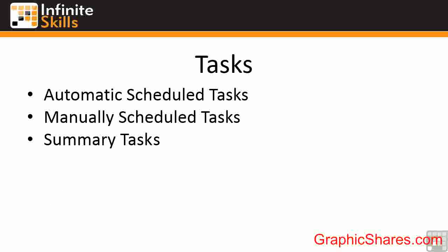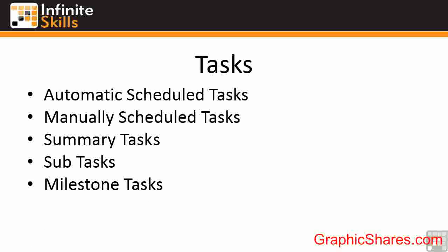Tasks have different types. You can have summary tasks that summarize a section of other tasks. There are sub-tasks, which are each of the individual steps within a summary task section. There are milestone tasks, which are simply a point in time — the end of a section, a milestone that you've reached. And then there is the project summary task, an overall task to look at the whole project.